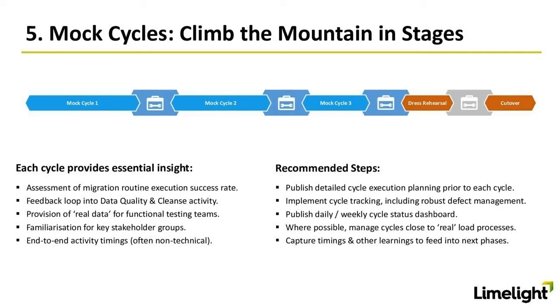And again, as I mentioned earlier, ideally, the mechanism we would advocate there is to use the same model that you intend to use later in the program for your actual cutover. Effectively trial running the information that you share outwardly and within the team in terms of the progress of a mock cycle, daily sessions on progress, mitigation actions, and so on. And the second last bullet point there, I think, alludes to that as well. So where possible, manage these cycles as close to the real load processes as you can, including things like the meetings you run to discuss them, comms in and out of the team, and so on, because that's going to help people understand how it's going to be done for real. And the final one really is about capturing timings and other learnings. Every phase we do should help us improve the next one.